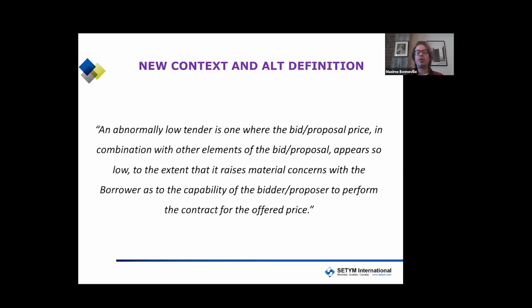And the goal is now to balance price with other attributes such as risk, such as technical requirements. In this new environment, an abnormally low tender is one where the bid or proposal price, in combination with other elements of the bid proposal, appears so low to the extent that it raises material concerns with the borrower as to the capability of the bidder or proposer to perform the contract for the offered price.